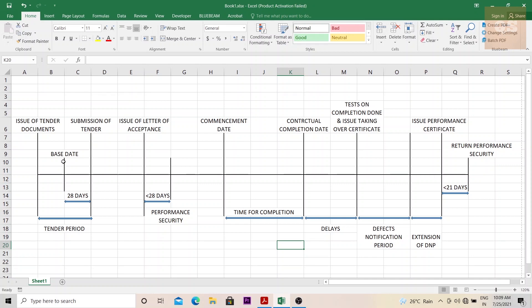So what is a base date? A base date is a date on which if there are any changes in law or legislation after this base date, there might be some increase in cost due to these changes. So based on this date, some indices are prepared, some cost indices are prepared, and some calculations are set out in the FIDIC contract based on which the contractor can claim for increase in price.